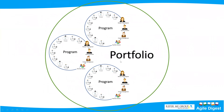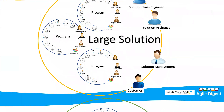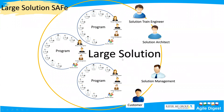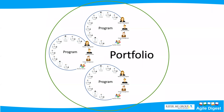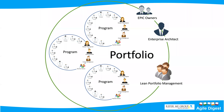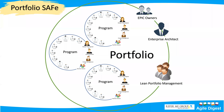That particular structure — combining multiple programs — is called Large Solution SAFe. Moving to portfolio: you can still have a portfolio without a large solution. At the portfolio layer there are different roles: Epic Owner, Enterprise Architect, and Lean Portfolio Management. The difference is at the portfolio level — I can have a large solution or a program directly under the portfolio.